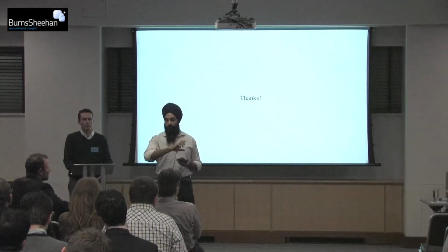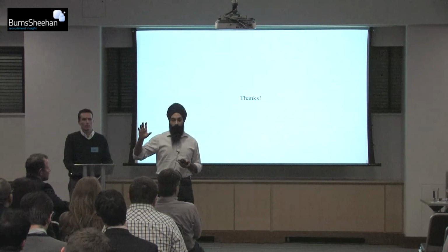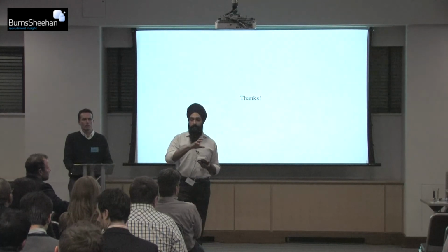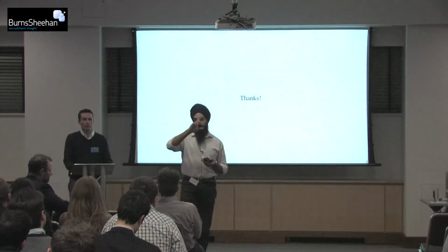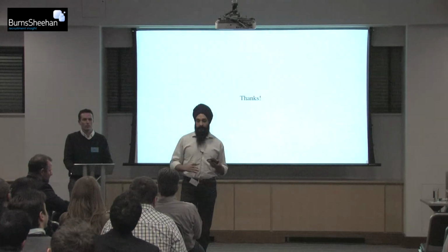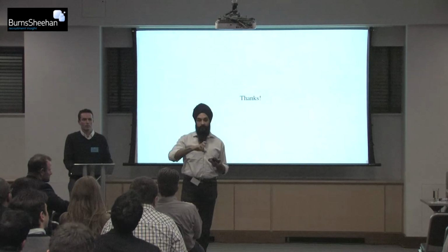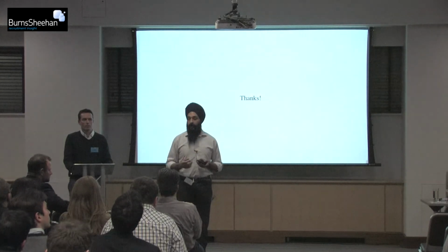So this needs to be communicated to the business, saying it's slightly lower than the main ft.com site, so we can afford for it to break, which means we can do other stuff around it. We can deliver it on a different platform if we need to. The SLA around it is different, the incident management, the service transition, the service delivery, release cycles, change management, etc. is all different because of the nature of the product. Different titles are also seen as 100% priority, and all the risk profiles are high, but it's about communicating to the business and saying, look, the reality is you can't really have this, because you need to prioritize what is high and what is low. Salesforce is a good example.